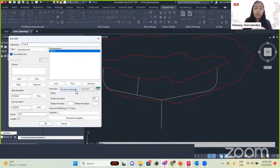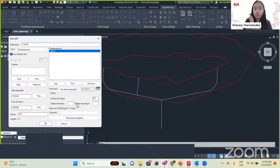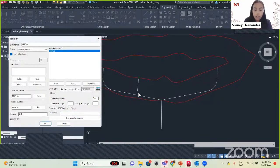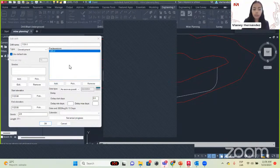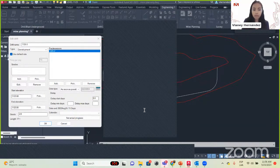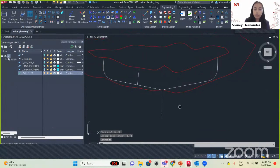The information about the dates is taken from the last drift and the length divided by the rate per day. The length changes if we change any of this information. For example, here the length is 17, it will take 11 days, and it will be done by August 15th. That's everything about the drift.